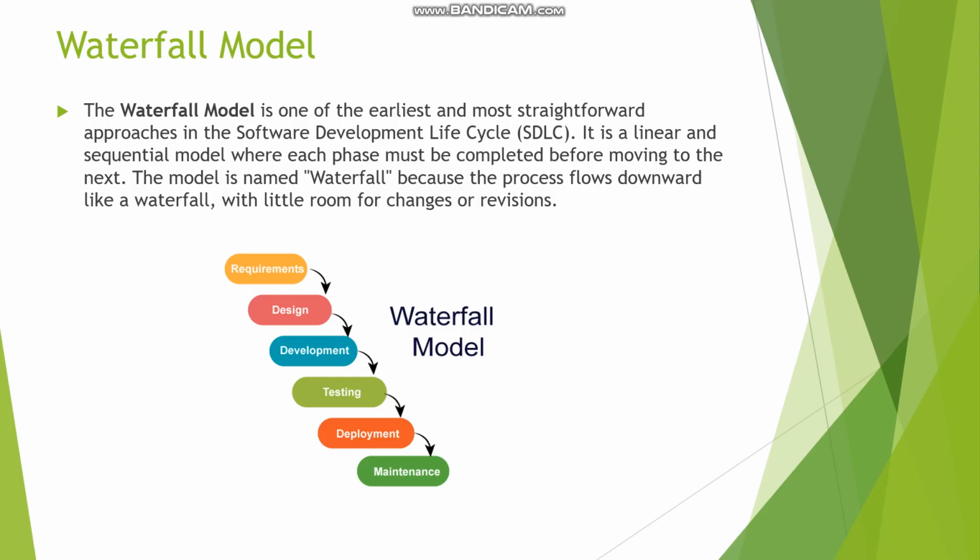It goes step by step: requirements, design, development, testing, deployment, maintenance. After every stage is completed, the next stage will come up. Before going to the next stage, the earlier phase should be completed. That is why it is called the waterfall model.